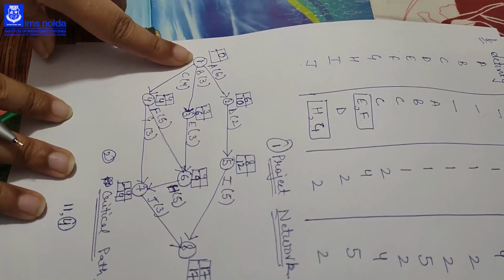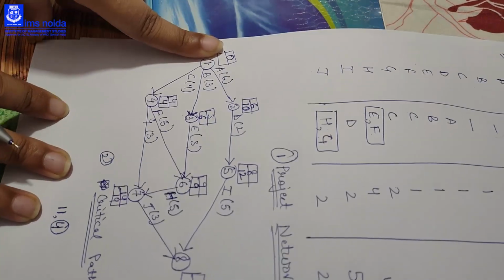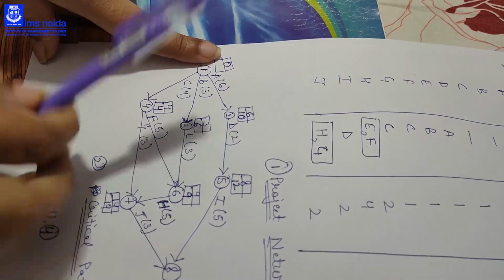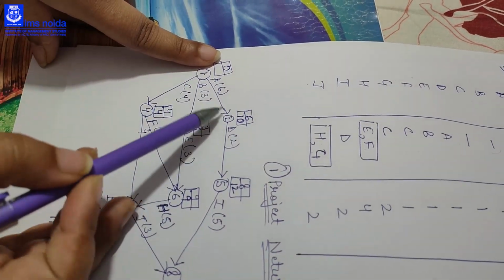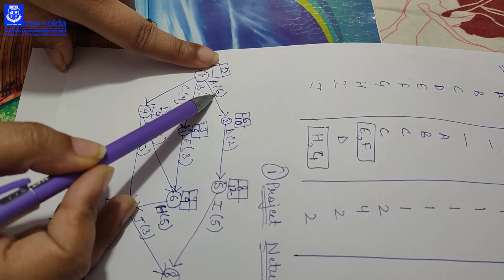Then we will come to the 1. Here also we need the LC 0. Let's see from where we get the 0 and whether we are getting the 0 or not. If you are coming from 2 to 1, you will do 10 minus 6, that is 4. You are not getting 0, so this is not the way.